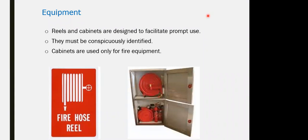One of the civil defense tests of the cabinet, and sometimes it comes as a comment: opening the door and closing, open, close, taking the reel outside, putting it inside again, out and in, to assure the mechanism of the reel is a mechanical fixation and robust enough to carry the load. Sometimes during the test, it comes up that after taking the reel outside once or twice, closing the door, it is not locking correctly. It was one of the comments to fix.